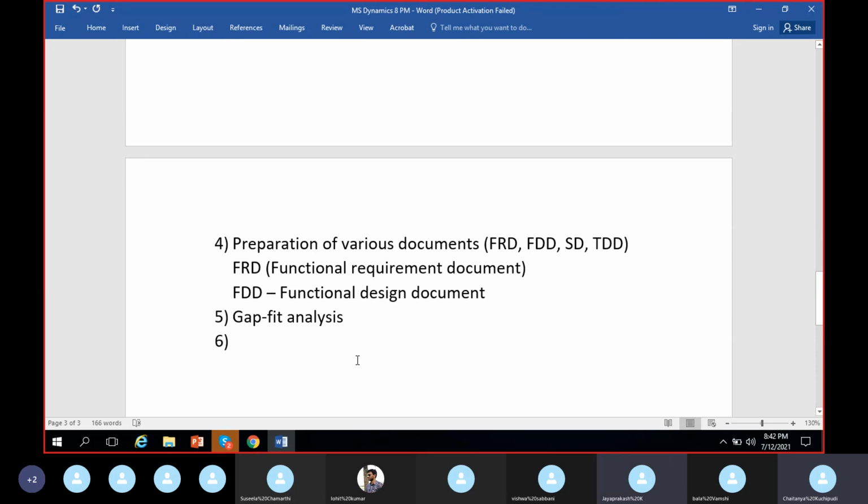Yes. Business analysts basically analyze the business. What your client is trying to explain is the gap fit analysis, right? Before starting a project, all the documents and everything should be ready. Exactly. We have to draw a project plan, how it has to be started, what are the different tasks that people have to do and different people have to be assigned. And if we do a proper gap fit analysis, only then will we understand what additional requirements have to be developed, so that we can give a task to the development team to work on these gaps.